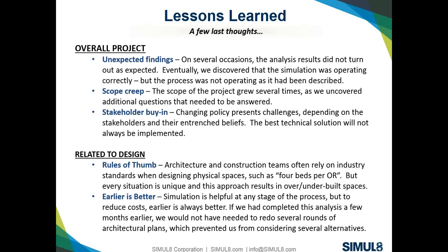That was a very interesting discussion point, because at the beginning of the project, we had pushed to do in-person observations and had gotten a lot of pushback: no, that's not necessary, we'll just tell you how it works. And then we ended up having to do a fair amount of rework at times because of that lack of understanding of the real-time process.